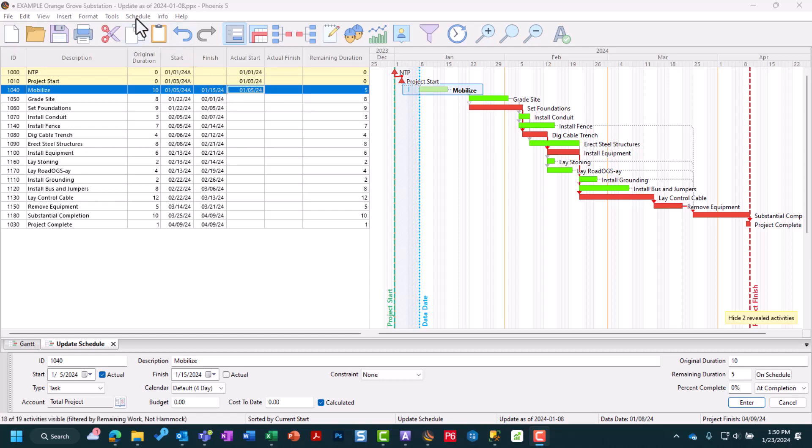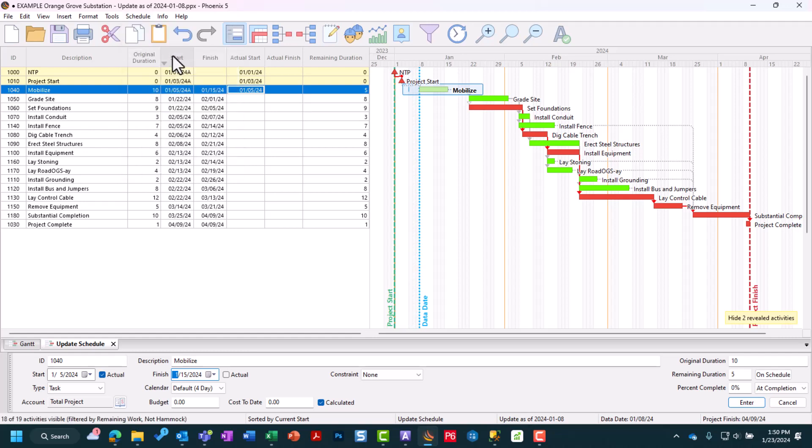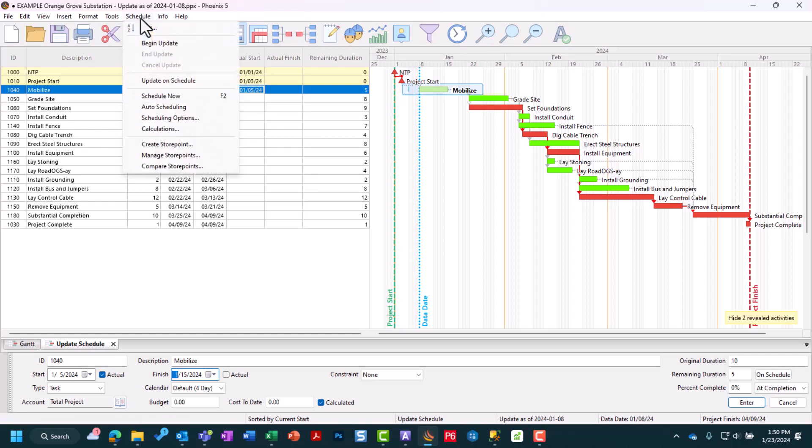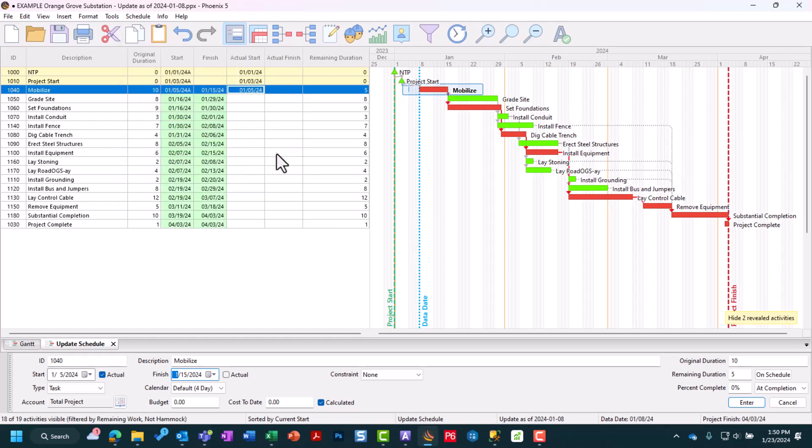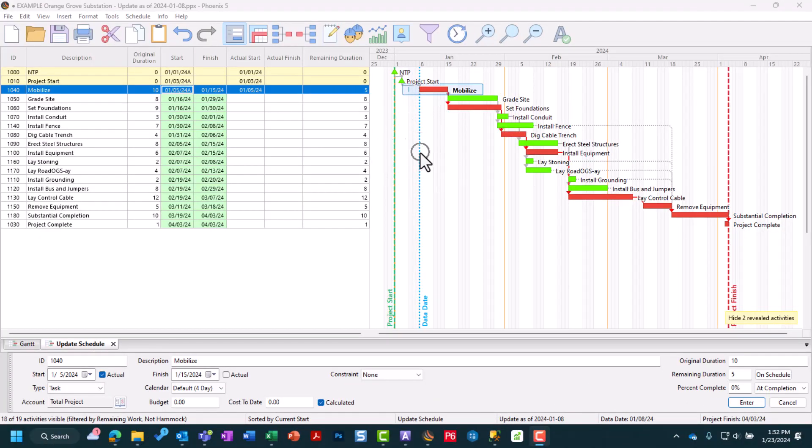Since there are no other activities that need to be updated during this period, we can come up to our Schedule menu, go to End Update, and then the last step is Schedule Now. You'll see how everything is now updated with the values according to the schedule updates we put in. Our data date has been advanced to January 8th. You can see the effect on every activity downstream if it has a green color in your start and finish dates. That means your updates affected them. They've been recalculated and our project is set to finish earlier than expected.